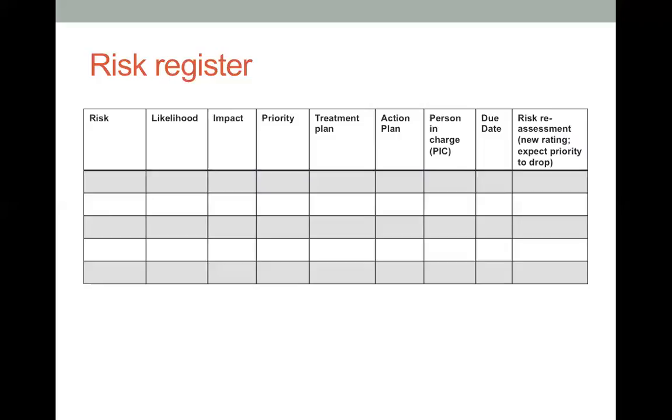All right, so we have discussed 2 risk events here. The first one is 4 likelihood and 5 rating for impact, and the second one was 1 rating for likelihood and 5 rating for impact. We can do the same risk calculation for risk level. The risk level for the second risk would be 1 times 5, which is 5. The first risk event has been calculated as 20 in terms of risk level, and the second one as 5.